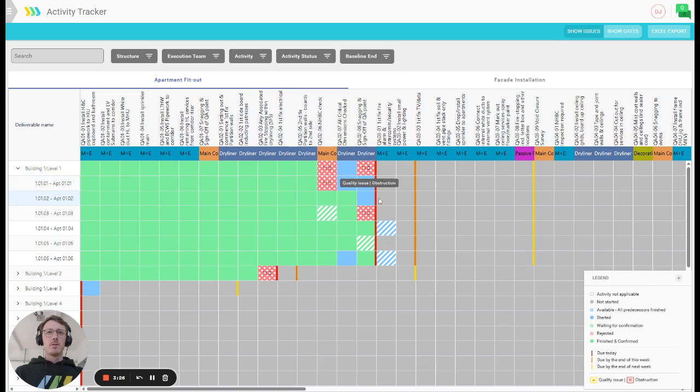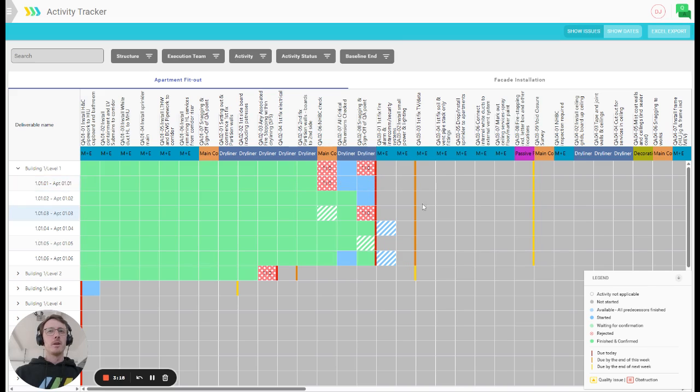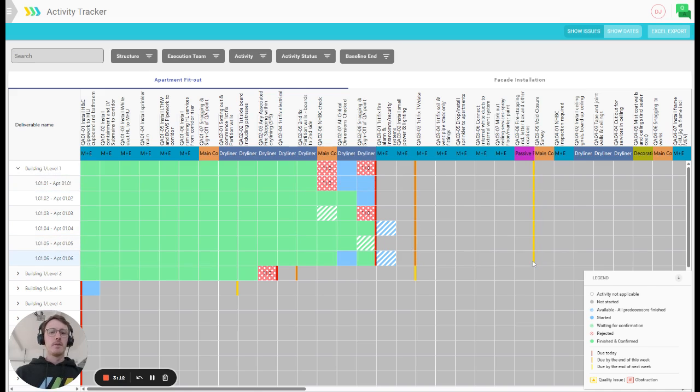You will also notice that there's three different drop lines here. Red indicates which activities should be done until today, so actually all of the boxes on the left of this should be green by now. Orange indicates what should be done until the end of this week and yellow indicates what should be done until the end of next week.